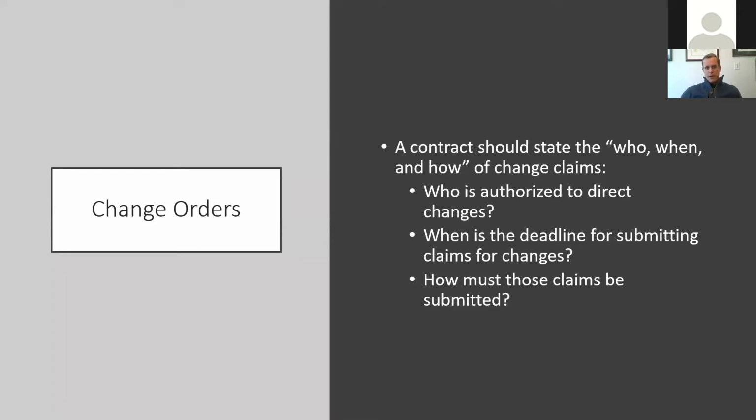But if you can somehow use those tools that are available to you, and Fohlio is a great way to start, documenting your costs, keeping that data in real time, keeping track of the communication with your client, keeping track of who told you to proceed, who authorized the change, when they authorized the change, and how they did it. Software like that is going to go a long way, and you're going to be well ahead of your client in documenting and substantiating change orders and ultimately getting paid for work that you should be paid for, and oftentimes are entitled to.